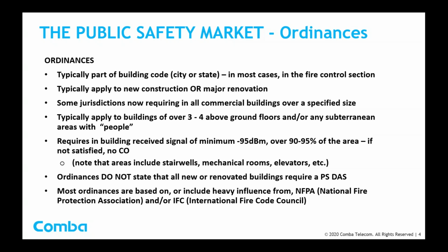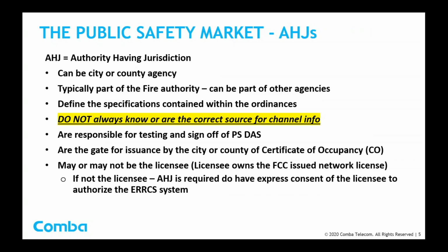Lastly, most ordinances are based on, or at least have heavy influence from, NFPA, National Fire Protection Association, and/or IFC, International Fire Code Council standards. Continuing on, the AHJ could be the city or a county agency. They're typically part of the fire authority, although they can be part of other agencies. They typically define the specifications contained within the ordinance.